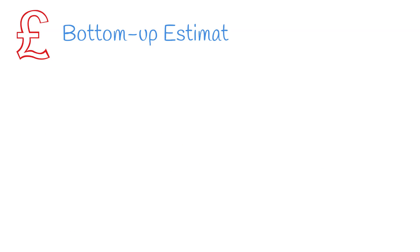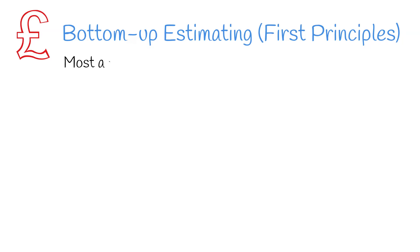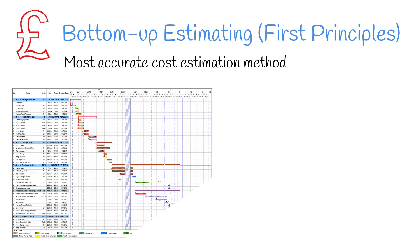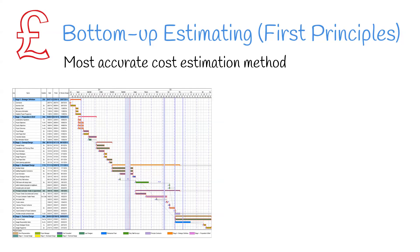And lastly, we have bottom-up estimating, or first principles estimating. This is the most accurate estimating technique. It's used when the project can be decomposed into manageable tasks, or when a work breakdown structure is available.